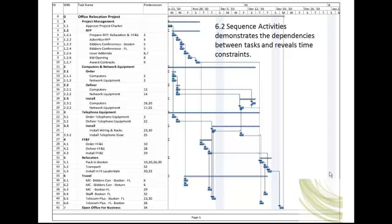Notice in this Gantt chart that all the interrelated dependencies are shown via these lines and that the project dates begin to fill in. Hopefully, this chart illustrates the benefits of sequencing activities prior to scheduling activity dates.